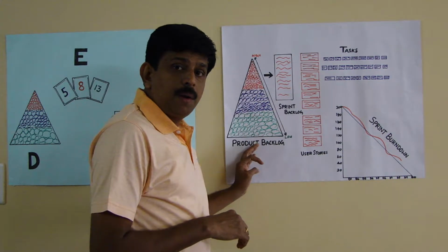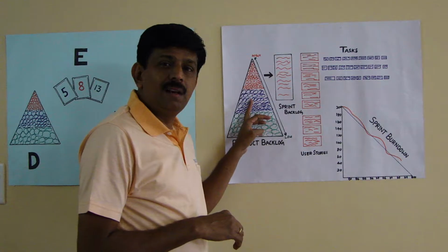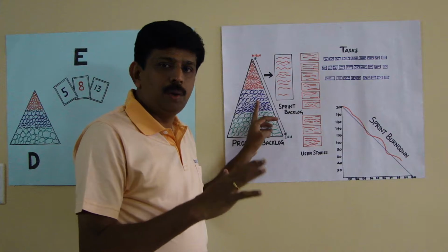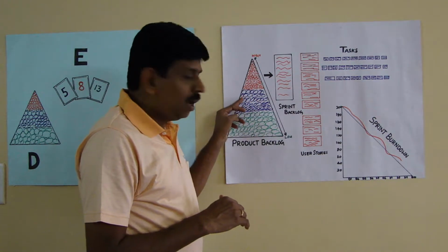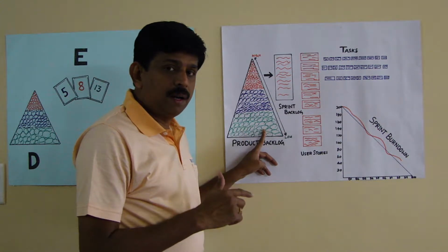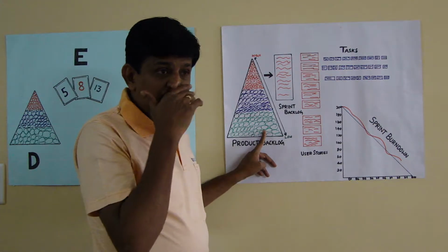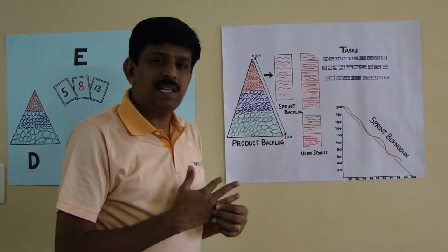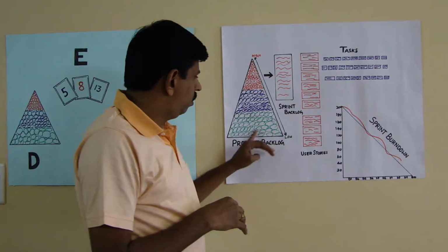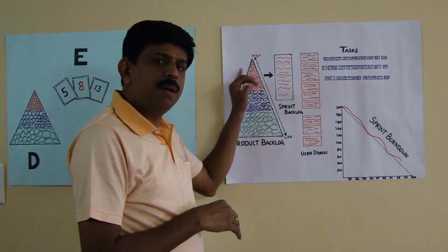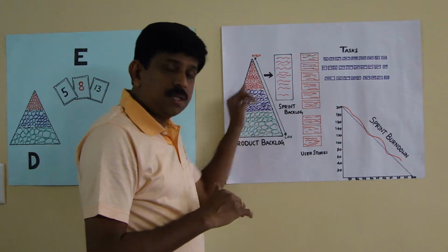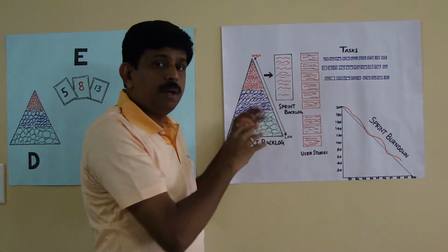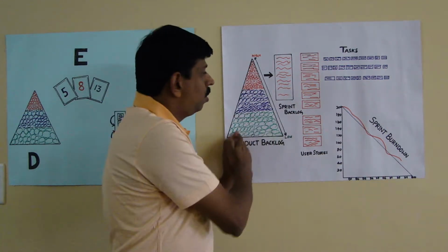But there were a few things that we did not detail. We knew we wanted so many windows and so many doors. What we didn't have any clarity on was the interiors, like where to mount the AC or where exactly to fit the fan. We didn't bother about that. We said, when we come there, we'll worry about it, but let's start building the foundation. So we had some requirements that were very, very detailed. That is called the sprint backlog.